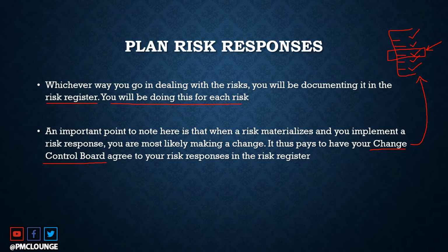So it pays to make sure that your change control board agrees, and not just reviews but also agrees to the risk register where you have documented all your planned risk responses.